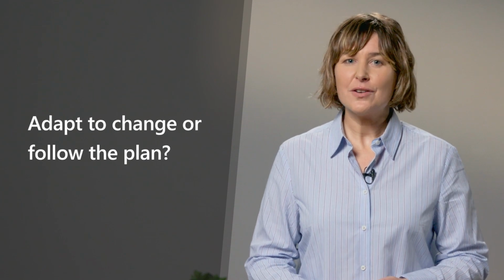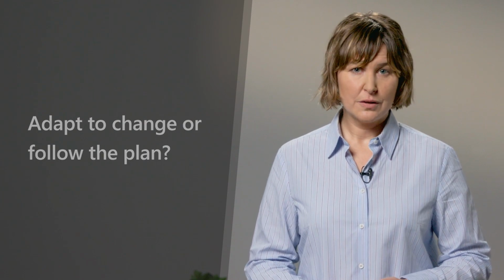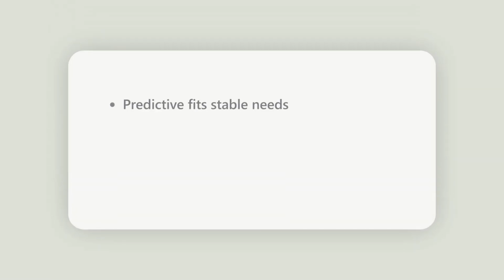Are the project requirements well-defined or likely to change? Do stakeholders want regular input or prefer a hands-off approach? Can the project tolerate change, or is strict adherence to the original plan crucial? Are frequent deliverables or a single final product more important? If the project requirements are stable and predictable, a predictive approach may be suitable. For projects that need frequent feedback or are more exploratory, iterative, incremental, or agile approaches might be more effective.